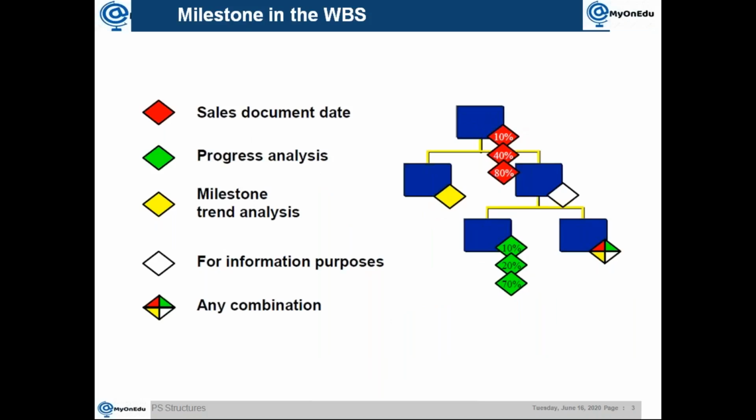So there are milestones. You cannot create only a milestone other than standard. Okay, standard is possible, but that is only for copying it. Either you have to create the milestone under a WBS element, or you need to create it under an activity. So based on the area where it is going to be created, the behavior changes. Okay. For example, if you are using it in WBS, in milestone, whatever the purpose you are seeing it.